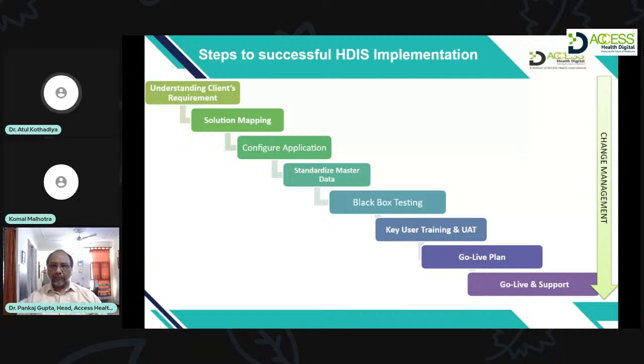Here it is the biggest lab, where around 25,000 samples were processed every day. Huge lab. When we started getting requirements, we thought that Big Bang is not the right choice for this kind of setup. So we decided first the registration department, then the accession department, which collects the samples either from walk-in patients, or from their clients, collection centers, or other network hospitals or labs.